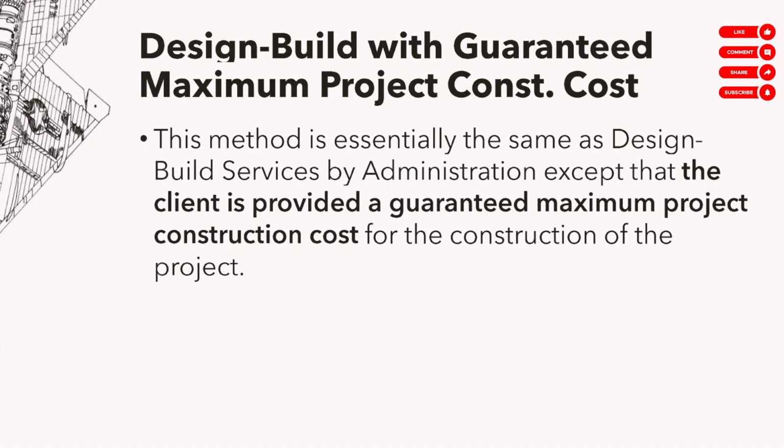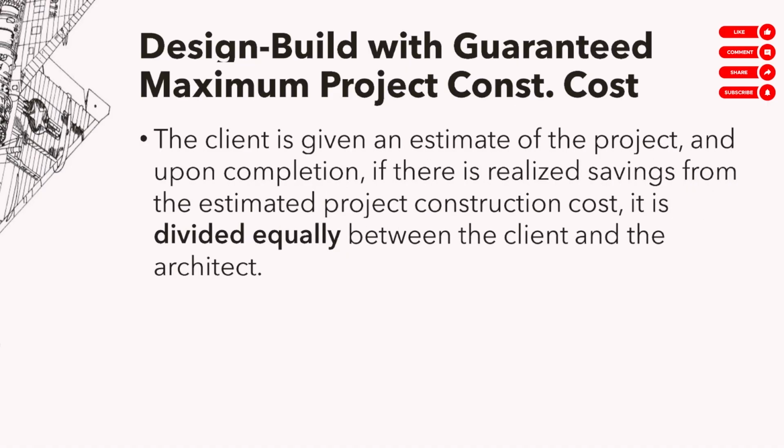First of all, is that allowed? Is that ethical? Normally, you're not allowed to guarantee your estimates like that, but there are times when you're allowed to. And one of those times is design build. No? In design build, the law and our standards of practice allow you to guarantee the estimates. Okay, so anyway, bottom line, this arrangement is exactly the same as design build by administration. The only difference is you do all of that plus you guarantee the maximum project construction cost.